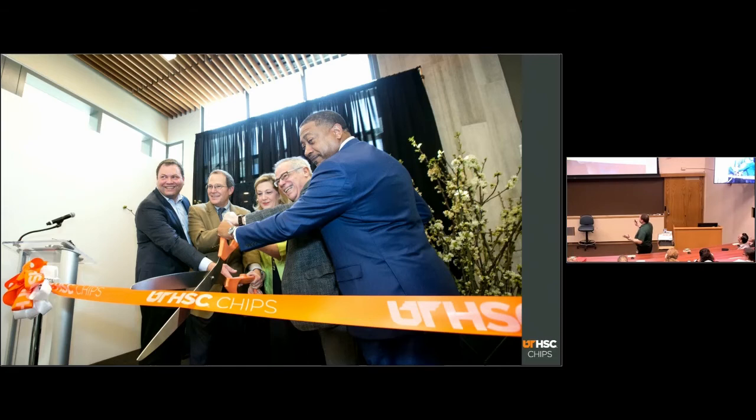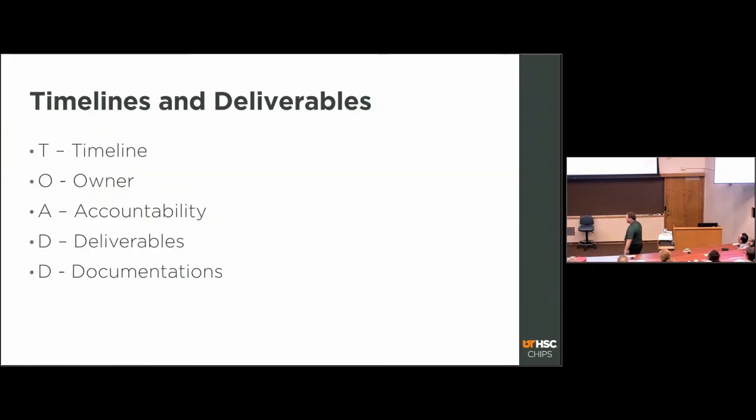So we did finally have our grand opening May 2018, and pointing out that this TOAD document, which I ran into later, really speaks to me now, and probably I would have approached this whole project differently, is that when you're dealing with these people, make sure you have timelines, accountability, deliverables, and documentation. And I can tell you the reason that we had such a long time for commissioning was because these things were not in place. And it wasn't always because we didn't recognize the need. It was just because the people who were managing the project saw it differently.